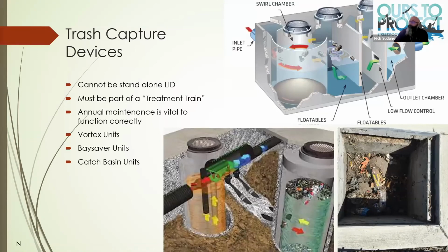The other thing that you might see in conjunction with some of your LID features is the trash capture devices. Again, just wanted to point it out because they are on sites. They are part of some of these maintenance declarations for owners to maintain. And some of these engineered systems do require a third party to come in and actually clean them out, provide certifications so that we can verify you're in compliance with the requirements in your maintenance declaration.